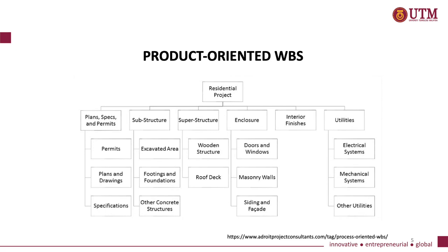In the context of information system project development, the elements of the rectangles can be represented as a system and broken down further to subsystems, and lower-level components in each subsystem can be decomposed into specific modules for each of the identified subsystems.